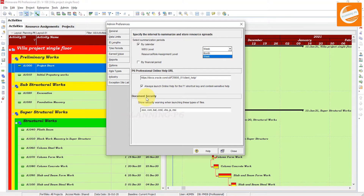Here are two tips. First tip: if you want all activity and resource data in the database to be summarized by financial period, including closed projects, you must create financial periods that span the date range of all projects in the database. For example, if the oldest project in your database has a project start date of, say, October 2000, your financial period should begin before that date.